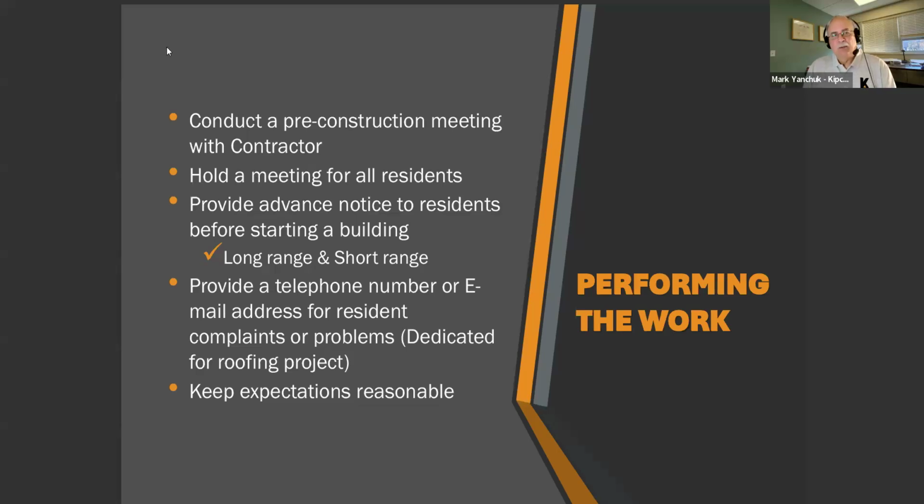After you've hired, when you select a bidder, there's a stage in the process after you select one of the contractors, and before you start the project, where you have to execute a contract. This is usually with the association's attorney, and the time frame could be as short as a week to maybe 2 months, depending on how fast your attorney can get that done. A lot of times there's a back and forth between the attorneys of the contractor and the association to work out the legalese. But once you have the contract signed, they may require a deposit.